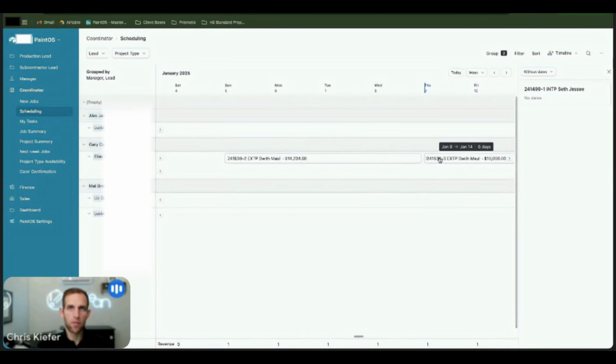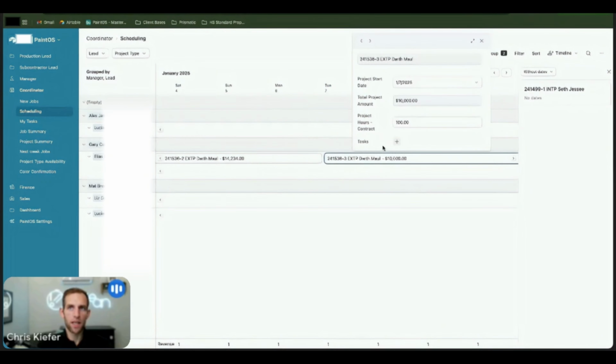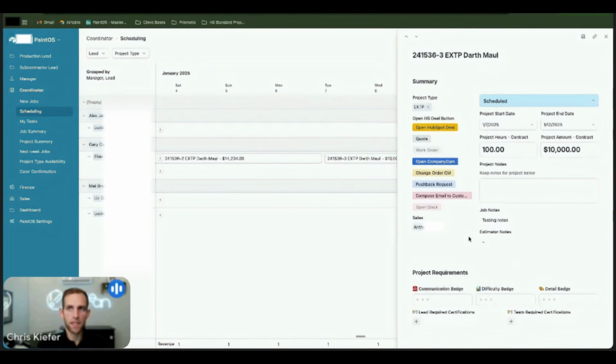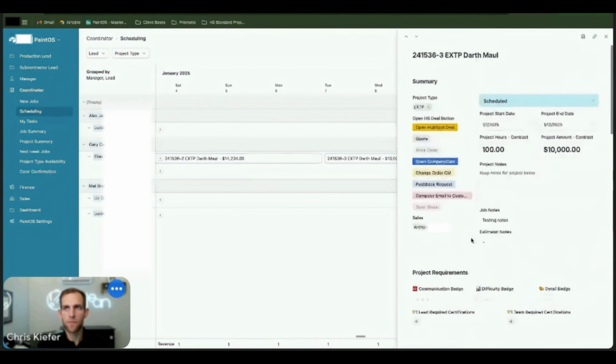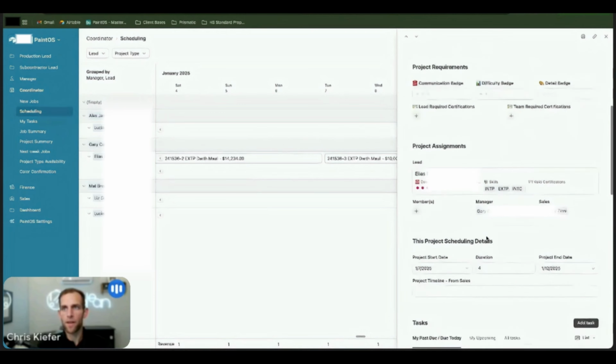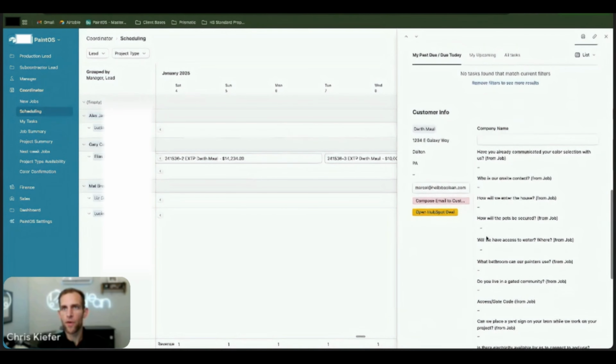So if I want to be able to overlap, like if you're ever doing that, D or Anissa, and you're wondering why is it doing that, you need to open this up and take away the predecessor that is in here, which is, we're going to have that here. I don't know if it's shown here. Yeah, let me hide that or unhide that.